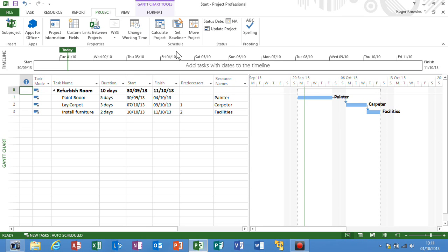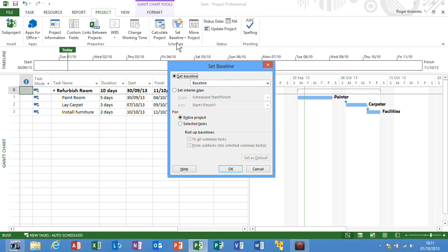This video is to show how earned value can be easily understood. There are a lot of columns behind earned value, calculations of costs, and this demonstration takes the practice file previously created into the world of earned value. Initially, the project must have a baseline, so we've set up our resources, our tasks and our assignments, costs, and we're going to set a baseline as standard.